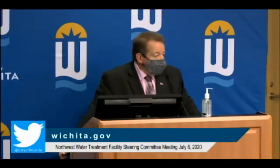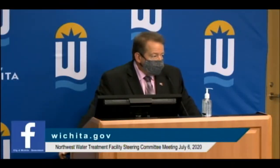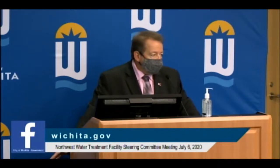Thank you. So you also alluded to the next step in this being a conditional use permit for the location of the plant itself, correct? And change of use too, because it's a matter of being able to get the necessary permission and zoning to be able to site it. So it's currently zoned SF5, I'm guessing. I believe it's single family, yeah. And what's the distance for petition from the site to the closest residential? What's the minimum? 200 feet. 200 feet.